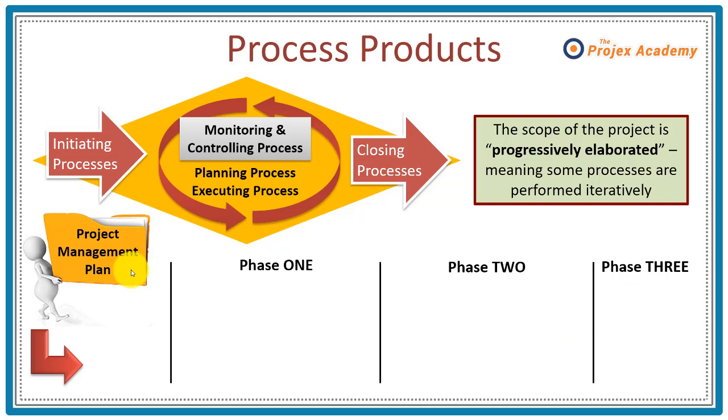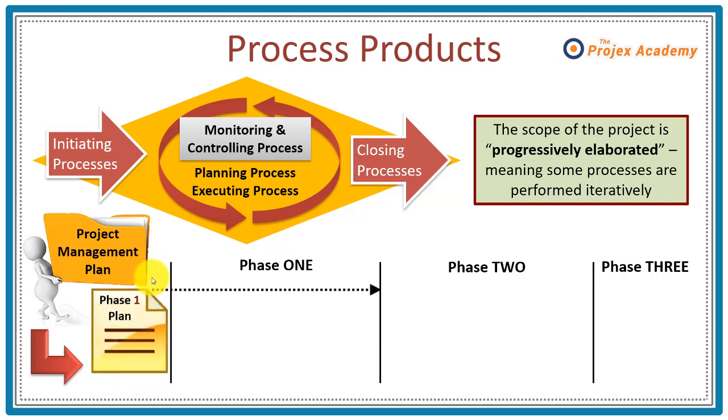So here is what I would suggest needs to happen. Now within the project management plan is the project plan, which of course one would expect to cover at a fairly high level, phase 1, phase 2 and phase 3. But as you and I both know, it's impossible to plan the whole project at one sitting. Almost certainly the project plan will need to be refined as it goes through the various phases. And the normal way to achieve this is to have both a project level plan and a more detailed plan for each phase level, and that might look something like this.